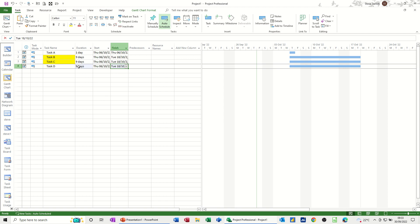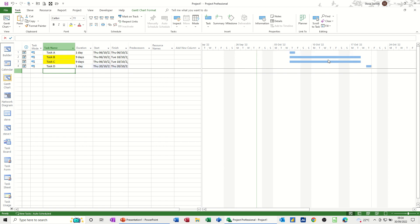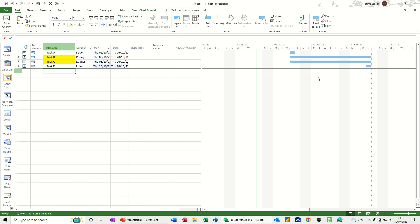And if I put that to one day, so it just snaps forward. So this is driving the start of these two tasks and this is driving the end of these two tasks. So basically these two tasks will grow depending where this is or shrink if I bring it back in. It takes a little time for it to move, but eventually it does move and then it picks it up. And there you can see it moving.